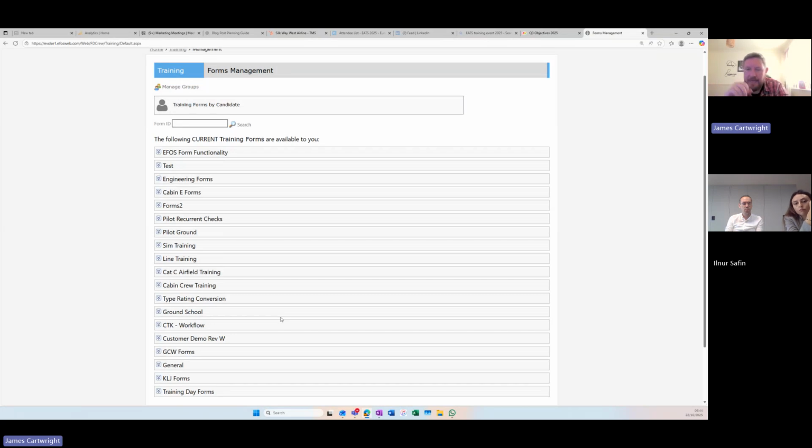And we ultimately create a statement of work that we can sign off between both companies, prioritize the order that we then deliver that statement of work, so that ideally we get you live with as many training forms as possible in the first instance, so you can just start using the system, start migrating across in a very managed way so that it reduces the impact on you guys from a training delivery point of view, and so that you can start to get familiar with the system